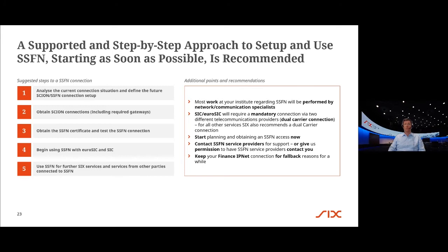Then once you've got your basic plan, we can start obtaining the SSFN connection itself from the carriers. And of course also your gateways, start installing the gateways, get it all ready. Once you're all ready, then you can come to SIGs and apply for the SSFN certificate.